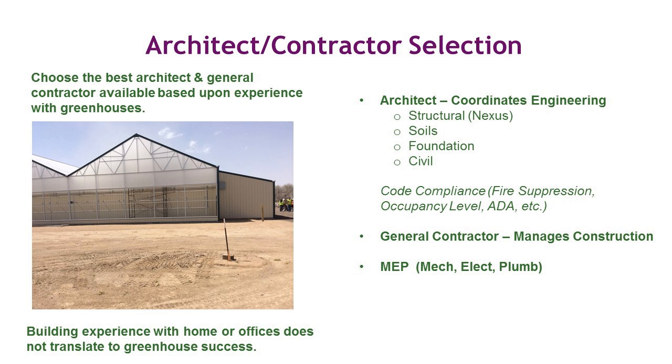The architect typically will coordinate the different engineers that are required for the project. So oftentimes if you go to a local architect, he'll have a group of people he likes to work with that cover the soils, the foundation, and the civil work, and he's accustomed to taking all their different inputs and putting it together into what they call a design review package for the building department. Nexus is just one group that works within that whole subset of groups that work with the architect, and we provide the structural information for him to build his design review package out of.